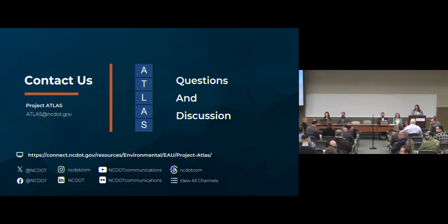If I have an active project that I'm looking to use this deliverable or the PS&E checklist, is Atlas looking for a specific naming convention in order to check that box? Or if I have existing deliverables, I need to re-upload them through the Atlas workbench in order for that to be living? Yes, if you have an existing project and you've already put your deliverables directly into SharePoint, you'll need to re-upload those through the Atlas workbench.